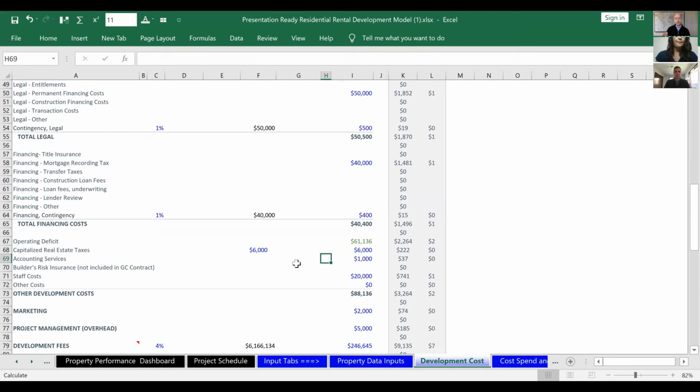Yeah, and that needs to be vetted with the municipality or district that you're operating in, because they could be assessing you at full, stabilized retail value, or at a percentage of that cost, or full cost. There are any number of ways they do that all over the country. So you definitely want to drill down into that. They're going to base that largely on either the appraised value that they do on their own, or they could base it on the construction permit, the value that you're allocating to the construction permit. So you just want to make sure that you know what that is, because that's huge.